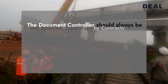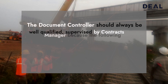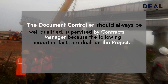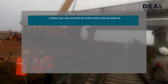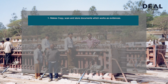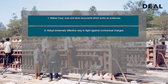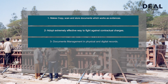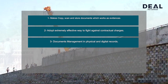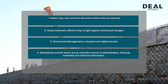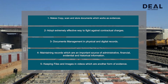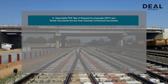The document controller should always be well qualified and supervised by a contracts manager, because the following important tasks are dealt with on the project: making copies, scanning and storing documents which work as evidence; adopting an extremely effective way to fight against contractual charges; document management in physical and digital records; maintaining records which are an important source of administrative, financial, evidential and historical information; keeping files and images and videos which are another form of evidence; and ensuring searchable PDF files of request for proposals and tender documents, which are the most important contractual documents.